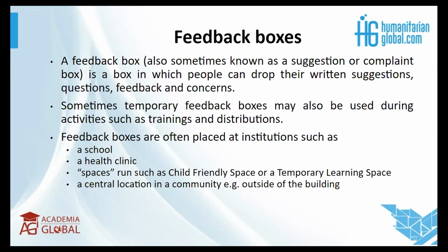Or if you're using suggestion boxes that are already in the school, to still have that communication so that the children don't feel that the teachers can already identify them, because the teachers already know the handwriting, for example. And also remember, even the teachers themselves could want to give feedback. So it's important to have the organization be the only ones with the mandate to open these feedback boxes, and then you, of course, assign a day to open these boxes and respond to these issues.